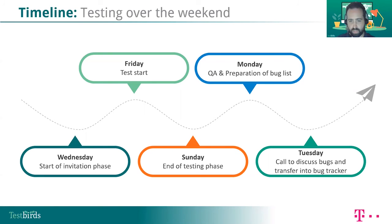The test starts on Friday, which I've heard matches perfectly with the Telekom release routine. For our testers, the test stops on Sunday, so they have the whole weekend to test. And we start back on Monday in the office with the QA, so the quality assurance. We're reading through all the reports, mainly the bug reports, and we're preparing the final bug list.